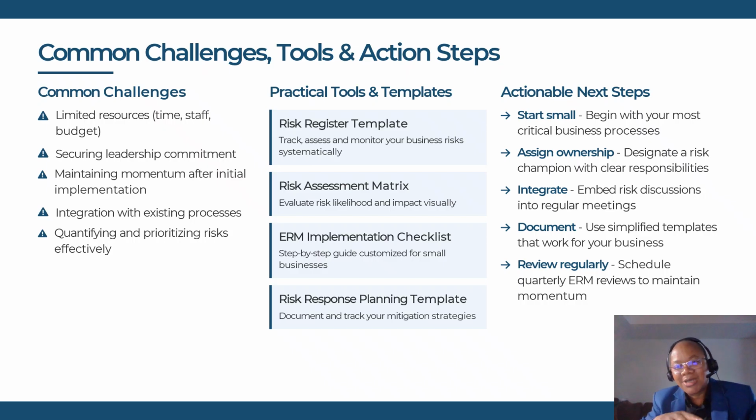Two, when the supervisor or the lead technician who is going to carry out that non-routine activity gets to the field, he and his team at that level will carry out what we used to call a toolbox talk. A toolbox talk encompasses the review of the procedure and the identification of the precautions to be taken if anything goes wrong. So he reviews that with his team at the work site and ensures that everybody understands what's going on and everybody's signature for accountability's sake is penned down. With their signature penned down, it shows they understood what their responsibilities are and they go about their business safely.